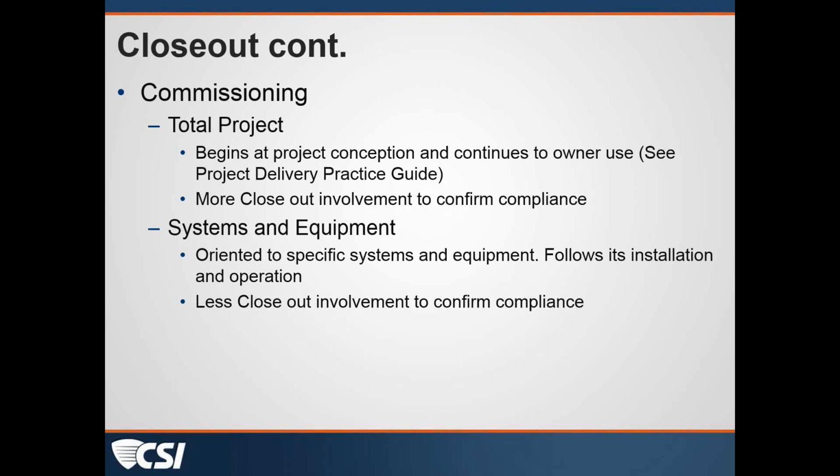Yep. As we're moving away from record drawings, I would just note something that we do: when we prepare the record drawings, we put a stamp and a disclaimer on there. We note that these are record drawings, and that this is compiled to the best of our information from information supplied by the contractor, and it may not be a true accurate representation of what was actually constructed on site.